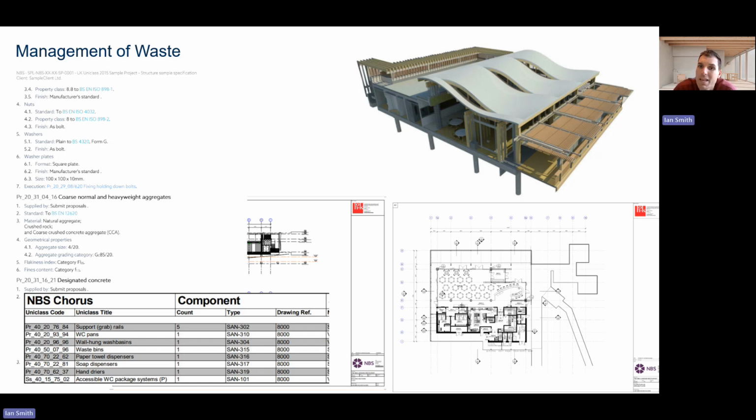Waste volumes can also be carefully reduced by the planning of our construction processes and encouraging responsible behaviour on site. So to do this, we will train our workers to minimise cut-offs, reuse materials wherever possible, and avoid over-ordering by having strict procurement processes in place.